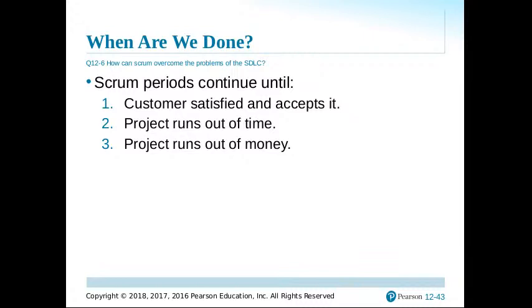Or we may base it on some time restriction. Even if we have 12 months to get a project done, once we run out of time, that means we're done. No problem, because we always have the system finished at some scale anyway. Because we run out of time, we can consider the system done. Or we run out of budget: we have some amount of money for doing the system, but now we run out of cash.